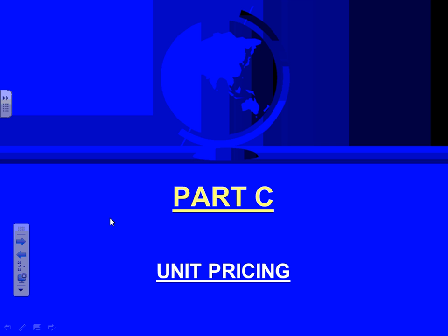Unit price, guys, is for something that you do more often and have done over and over again, and you give it a value. You can't give a unit price for a hospital, can you? They change a lot. It has to be things that are the same. Changing a service all the time is almost the same. A developer comes in and builds multiple identical units, right? Give him a value. There is 15 grand for each house that you build. Done. Things like this, you can allocate a unit price for.